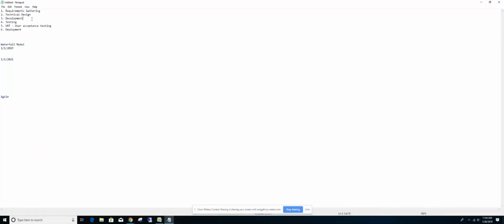They have the requirements. Once the requirements are there, the BAs create tickets. Tickets are nothing but, let's say you want to implement a feature. That feature will be divided into tickets, like 15 tickets or 20 tickets, based on the capacity. Those tickets will be assigned to developers. Let's say you have 3 developers, and each developer gets 5 tickets.